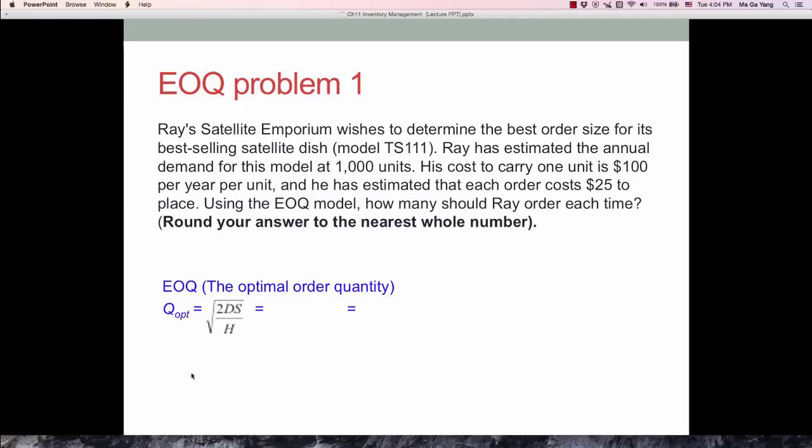What is the annual demand? What is the ordering cost? And what is the holding cost? These components need to be identified in this problem. Annual demand here is 1,000 units. And then ordering cost or setup cost, these are the same term, which is S equals $25. Each order costs $25 to place. And holding cost or storage cost equals $100.